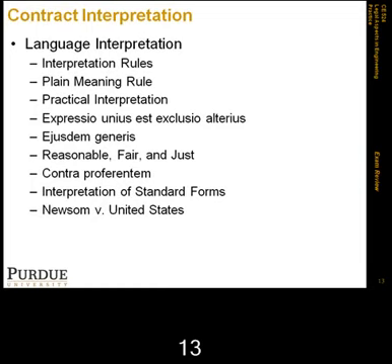The contractor later discovered that the owner just wanted the second floor on all of them, and they complied, but they made a claim for the extra cost, and that claim was denied by the VA Board of Contract Appeals because the ambiguity was patent, and it imposed a duty to inquire on the contractor.